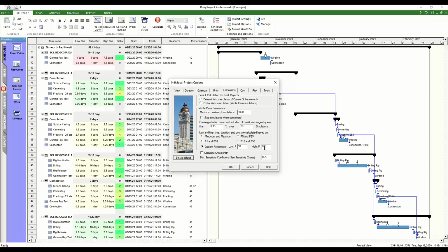The cost could be anywhere, and when you look at histograms you get a better idea of the distribution, but it's an 80% chance at or below. When we set P80, the confidence level is fairly high and would be considered conservative. The higher that number is, the more conservative, the less risk you're taking on.